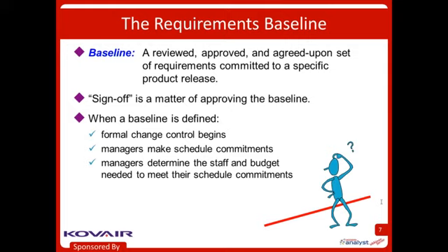When someone signs on the dotted line that says, okay, I'm approving this, I'm signing off, it ought to mean something like the following. They should be saying, I agree that this set of requirements is a foundation for the next stage of work to begin. I further agree to make changes after that following our change control process. And here comes the part nobody likes. I also agree that changes in those requirements might demand that we renegotiate commitments.